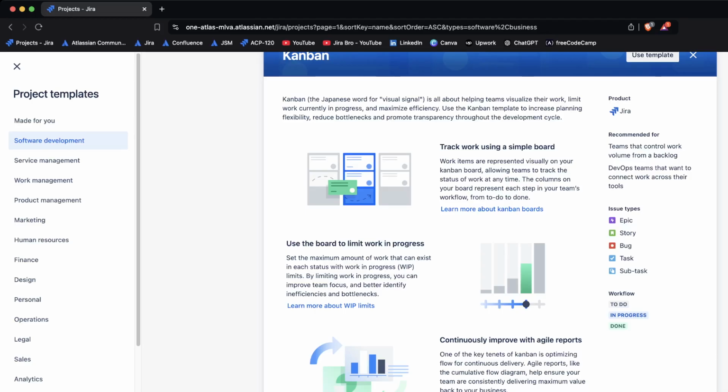Also, within the Kanban itself, yes, the prioritization is there as well, because based on the agile methodology, you should be working on the most critical issues first, then going to the other issues. It's the easiest thing to do some of the low priority stuff and say, my work is done, but that is not a good practice, because you need to tackle first the most critical work that is in there.